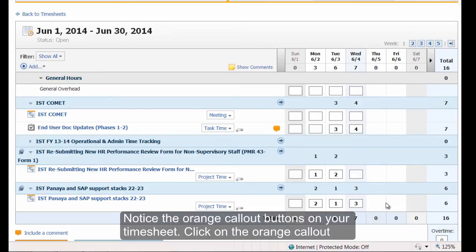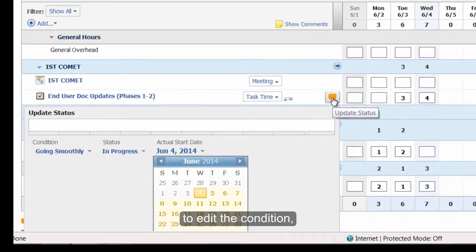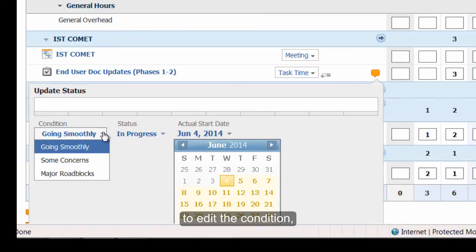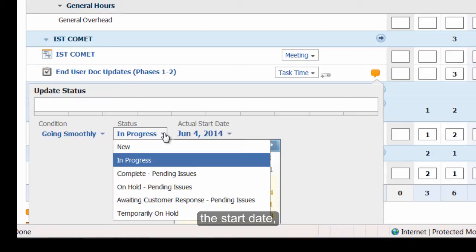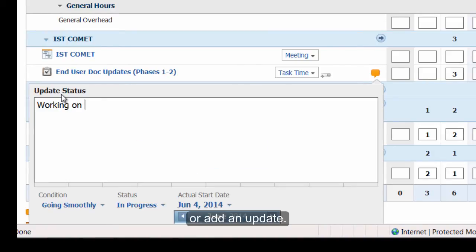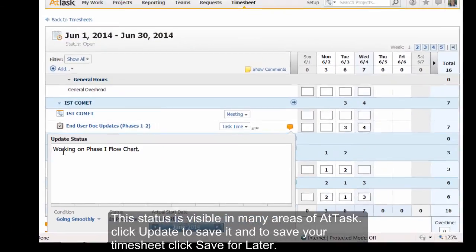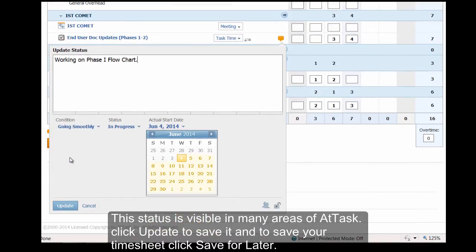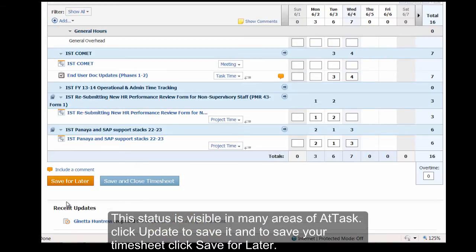Notice the orange call-out buttons on your timesheet. Click on the orange call-out to edit the condition, the status, the start date, or add an update. This status is visible in many areas of that task. Click Update to save it. And to save your timesheet, click Save for later.